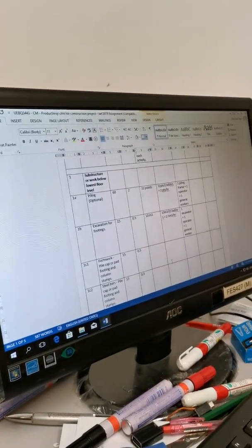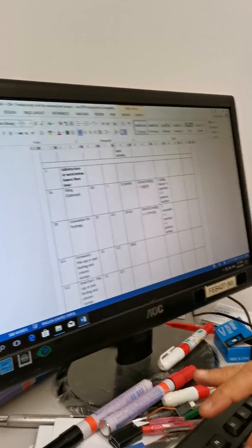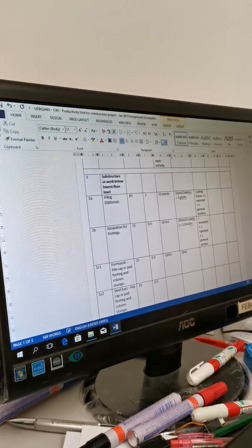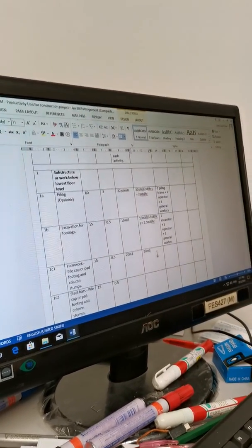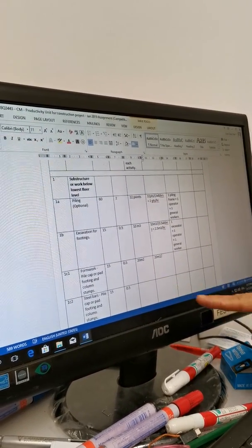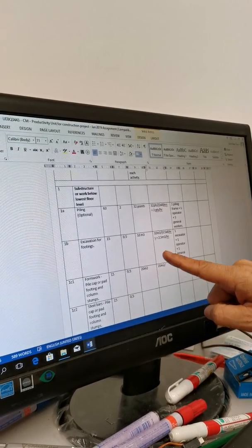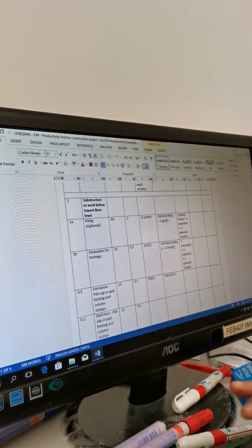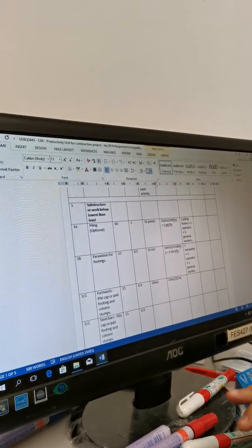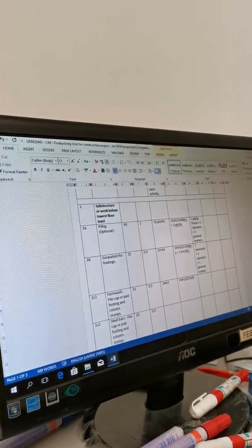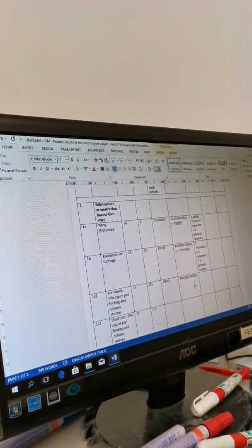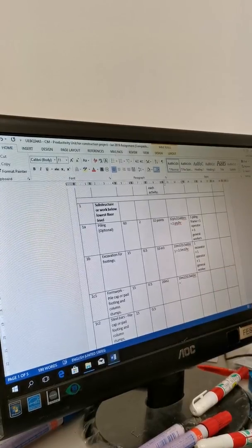And this is the formula. Let's say it's 20 meters square. Okay, I put here 20 meter square, example theory here. So how to calculate this one will be 20 meter square divided by the so-called 0.5. That means you have your 0.5, that is days, times 8 becomes hours. See, okay, so this one will be hours. So equals to, what is the figure?